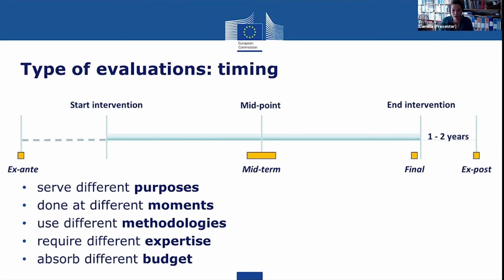Now, the midterm evaluation, when is this carried out? Normally, about midway through the implementation. So this was easy. Why do we carry out a midterm evaluation beyond the compliance or the obligation to carry out this evaluation? It's to understand progress against plans and to understand why progress is being achieved as planned or maybe is not being achieved as planned. We carry out midterm evaluations to suggest a number of corrective actions, corrective measures, which will enhance the efficiency and the effectiveness of the project in the remaining period.